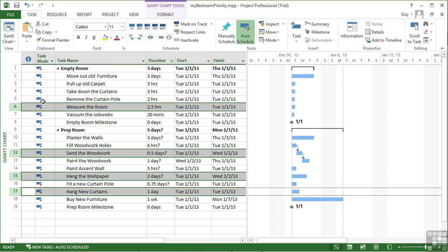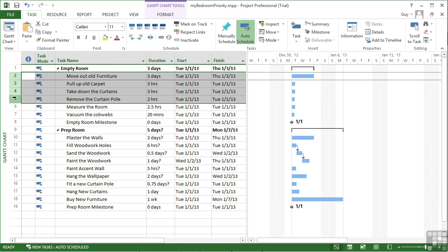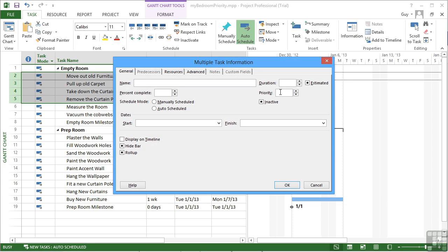And we could go and change that little batch there. Task information and make them all 350, so they're less important than the average, the middle.